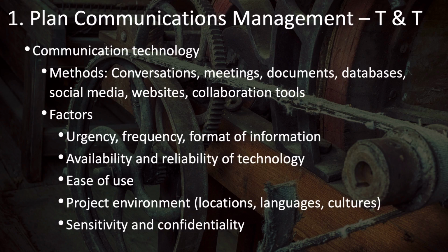For example, you may find that certain stakeholders don't usually get the message when it's something urgent. They don't get it soon enough anyway. And so, rather than sending them a message or an email, you need to pick up the phone and give them a call, or go down to their office and meet with them face to face. Other stakeholders are working closely with their messaging system or collaborative tools, and you can send them a message and get a very quick response that way. It all depends on the message and the recipient as to which type of communication technology you use for which type of message.